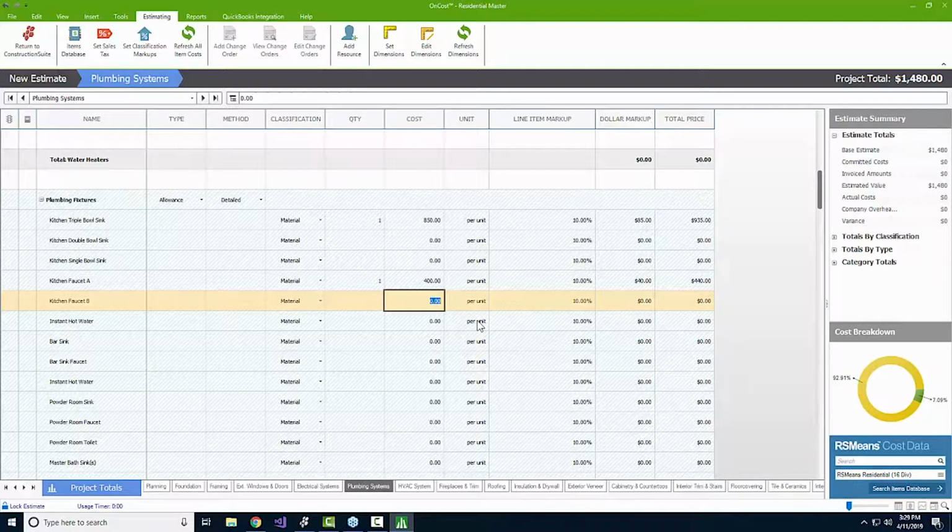Yeah, and what I always find interesting about those jobs in particular, you've got a contract amount, and you might come in under that contract amount, but you have no idea how accurate it is. Or most importantly, if you're constantly rearranging the numbers, deliberately bidding high in some areas and low in other areas, you won't be able to catch some of the most important price changes. Like, about a year and a half ago, lumber costs almost doubled in certain areas in the country. And our clients caught it pretty quickly, because they were able to see that they were spending way more money than they thought they would be, and they were able to update all of the other estimates that they were building at that time, because they saw those costs going up for lumber.